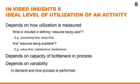If you've already included and adjusted for all these things, then you can plan for a high-capacity utilization. If you haven't adjusted for these things, then you need to leave buffers for those, and you have to say: I can only plan for 60% or 70%, because some of that remaining 30% will get used up in these other things.